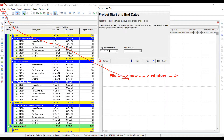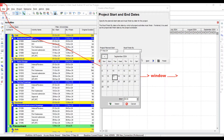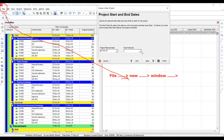This shows today's current date, but you need to change it. Your project start date is not today — let's say your project is going to start next month, on the 30th of October. Select that date. There is no need to give a finish date. You just need to enter a start date to operate on Primavera P6.